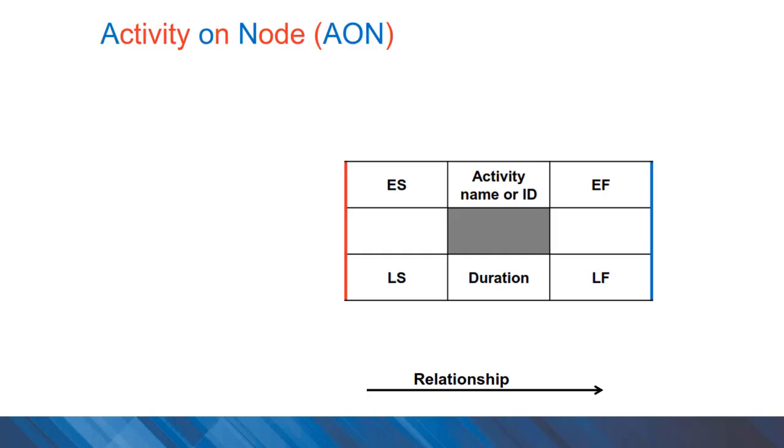Activity on node networks are a very clear way of illustrating project networks. In this activity block, we have early start time and early finish time on the top row of the activity block, and late start time and late finish time on the bottom row of activity blocks. Obviously, relationships are shown by arrows.